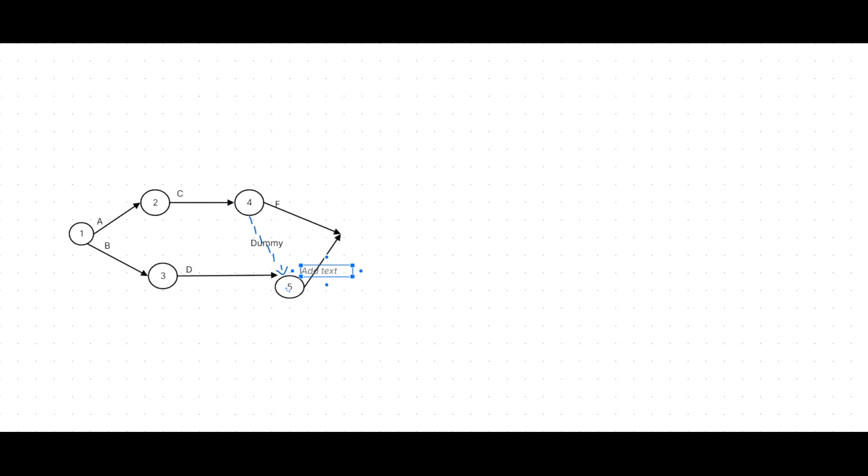We have only two activities remaining finally, F and E, but we should complete both using another same event, because they start in separate events. At event number 6, we are going to complete the entire project. That's the way you need to draw the correct diagram.